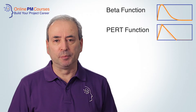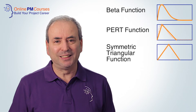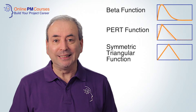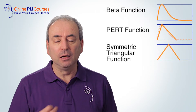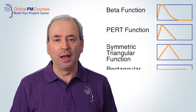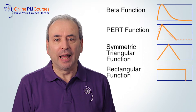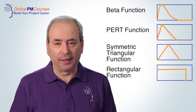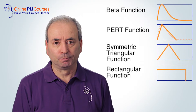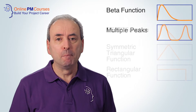The simplest distributions are either a symmetrical triangular distribution, which suggests that a delay of a number of days is equally likely to finishing early by the same number of days, or a square or rectangular distribution, which says that any level of delay or advance is equally likely up until the point where it just won't or can't happen. A distribution doesn't have to have just one peak — it can have multiple peaks.